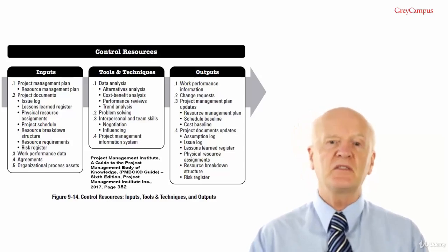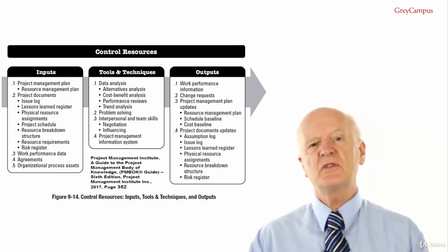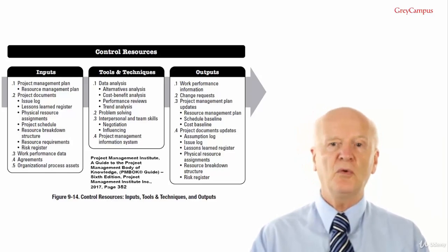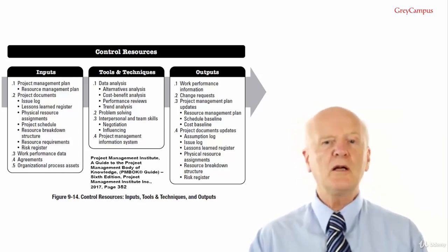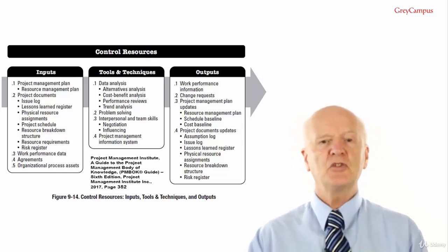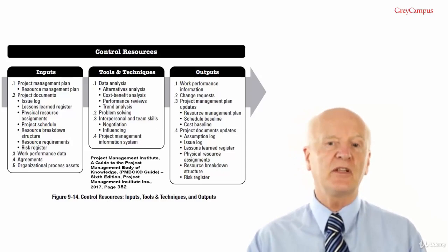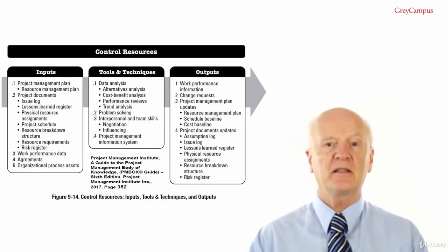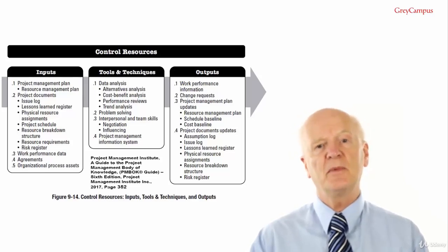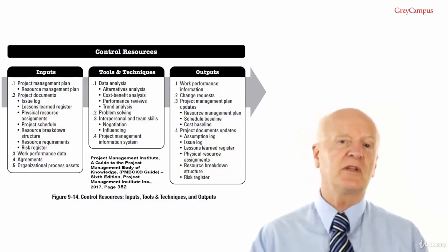And remember, for the exam, when you see root cause, you should always think of Ishikawa, fishbone, cause and effect, or Y diagram. Solve. Choose the suitable solution from a variety of available ones and check the solution, which means to determine if the problem has actually been fixed.